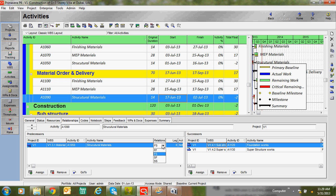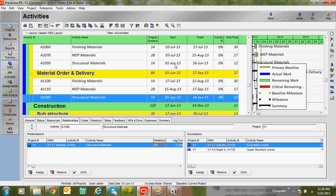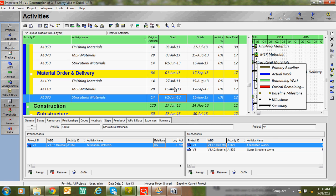Now I'm going to change the relationship between activities to Start to Start. In some cases, you don't need to wait until completion of all material submission approvals — if you get some approvals for steel and cement, you can proceed with the construction activity. In that case, you can choose Start to Start. Go to Schedule. Here you can see the start date is 1st June, the same start date — previously it was 17th June because the relationship was Finish to Start. Now with Start to Start, the same day is appearing.